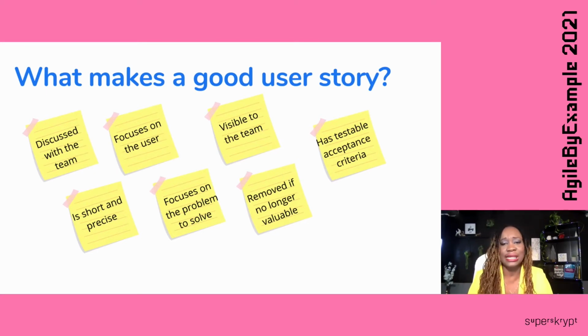We had discussions, we talked about it, and then the product owner says, we can't do this anymore, we take it out. And we have it in the backlog, and then something else happens and it stays in the backlog and it's been there for a year and nobody removes it. People are afraid to delete user stories because you just don't want to lose your work. It might come back one day. But you should be able to remove a user story that's no longer valuable.